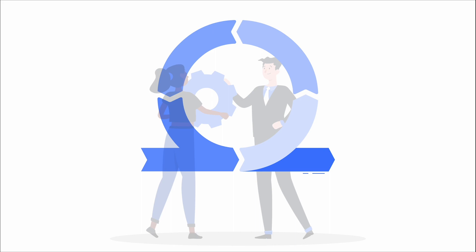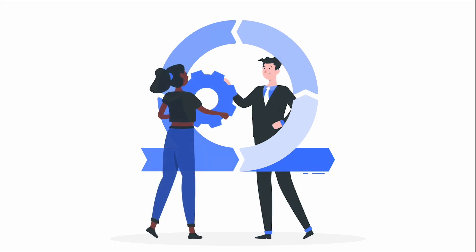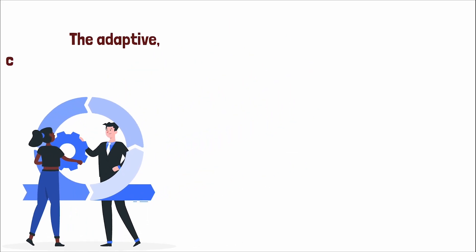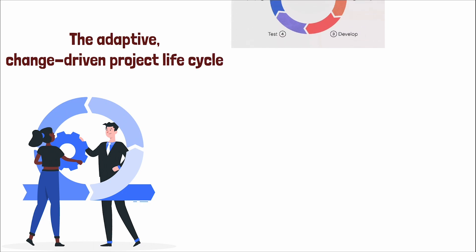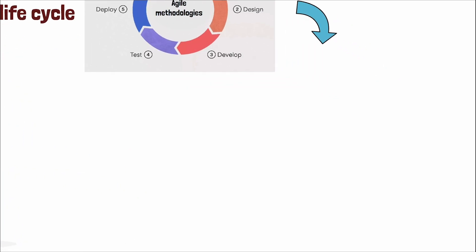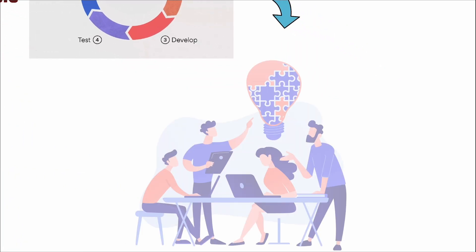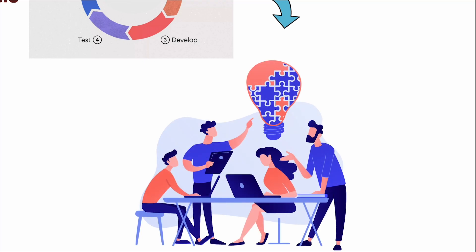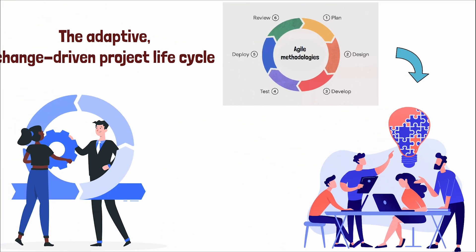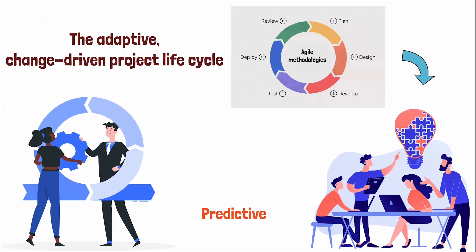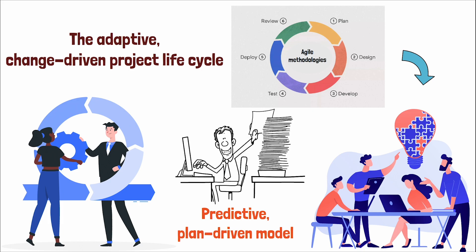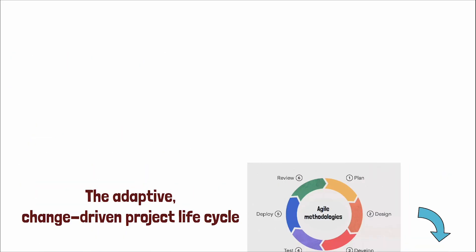Project life cycle models are also influenced by these organizational nuances. For instance, the adaptive, change-driven project life cycle, characterized by iterations known as sprints, is a hallmark of agile methodologies. This model is best suited for environments where requirements are volatile and rapid adaptability is paramount. Conversely, the predictive, plan-driven model is more aligned with stable environments where scope and requirements are well-defined from the onset.